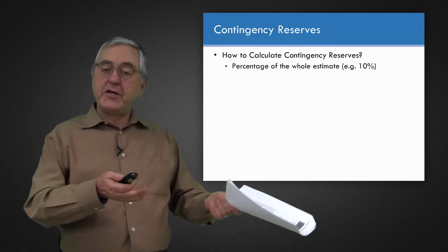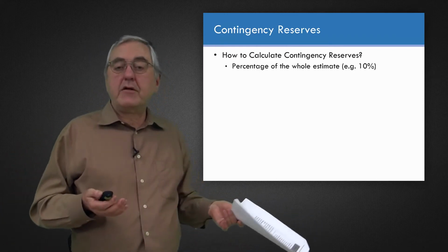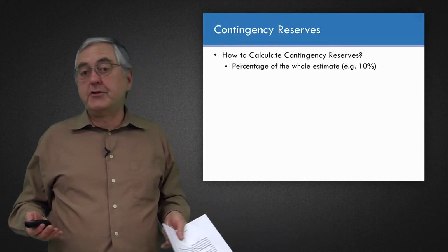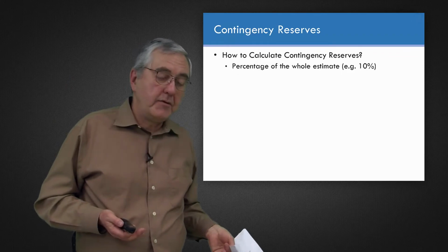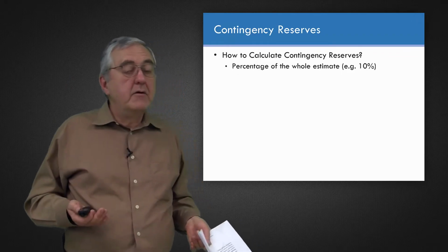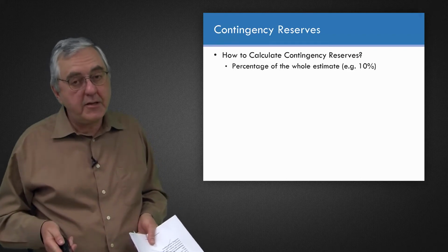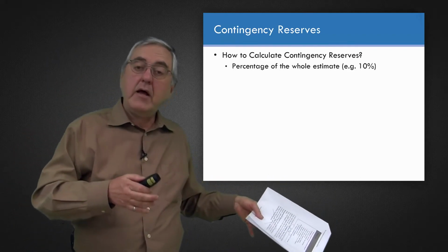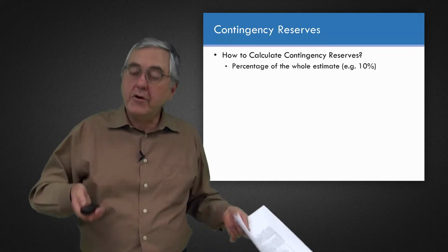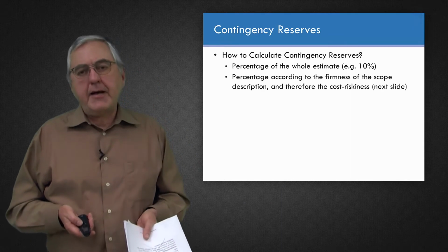Like in your organization, for these kinds of projects, maybe we estimate the project and add in a contingency reserve of, say, 10%, or maybe it's 20%. In fact, in some organizations or some types of projects, you estimate the project and then add on 100% of that estimate as a contingency reserve. It could even be as high as that when the uncertainty is reasonably high.